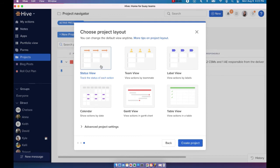I would say that across these three Kanban views, the most commonly used one is definitely the status view. Just because it groups all your actions by their status and it's the most simple way to track your projects.